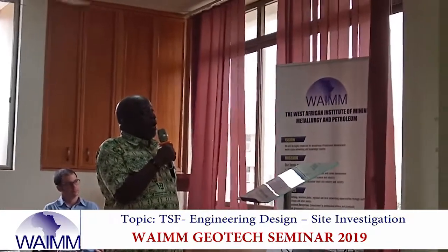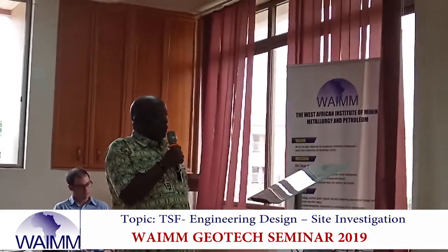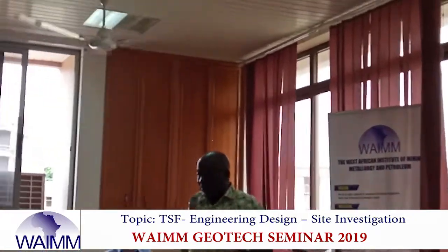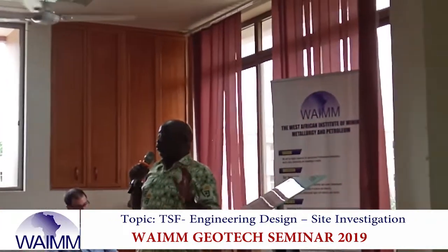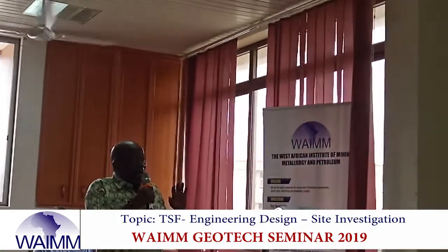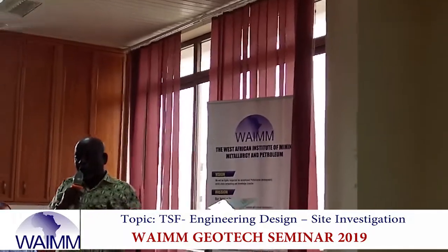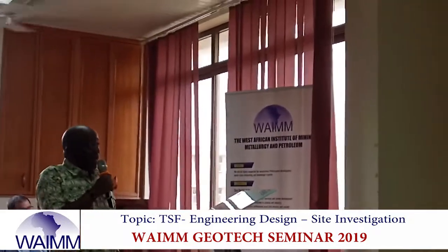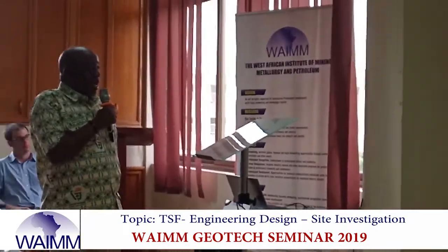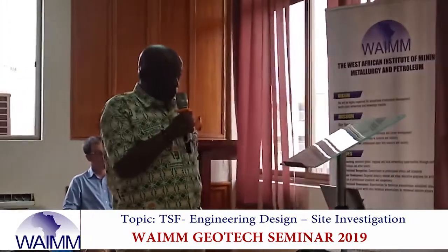So how do you carry out the preliminary investigations? Well, to embark on a site investigation, first of all, you have to do what we call the preliminary investigation and site reconnaissance survey, what we call the walkover survey. You walk over your whole area, you do a desk study first, you do a walkover survey, and then you provide an inception report.